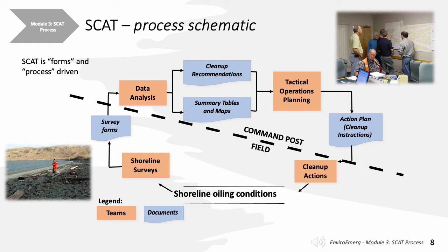All the information has to be packaged and ready to be delivered, and then communicated to the unified command for approval, packaging needs an action plan, and as well the assignments then have to be communicated to operations. Their approved work assignments are then provided to the cleanup operations for what they're supposed to do for the shore that you assessed.